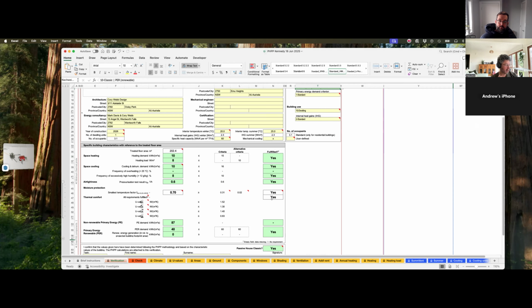So first, what we're ready for is the initial review. For the initial review, we're fine to use some of these default settings. For pre-construction, we need to have nailed down all the components we're using. I try and get the initial review as complete as possible.